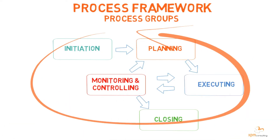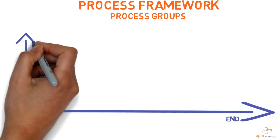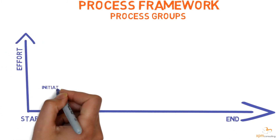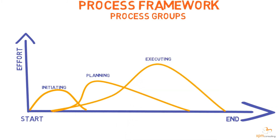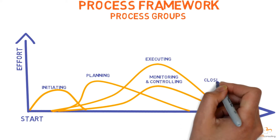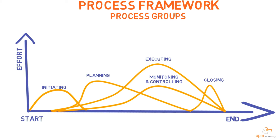Process Groups represent the second dimension of the Project Management Framework. Project Process Groups are used to categorize processes according to their purpose. According to the PMBOK Guide 6th edition, there are five Project Management Process Groups: Initiating, that defines and authorizes the project or phase; Planning, that defines project objectives and the actions required to attain them; Executing, that coordinates all the resources to carry out the plan; Monitoring and Controlling, that measures progress to identify variances and take corrective or preventive action; and finally Closing, that brings the project or phase to a controlled end.